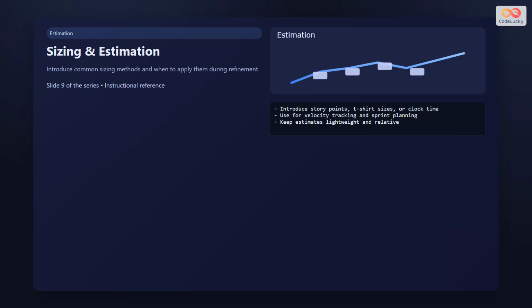Teams often face challenges during refinement. Requirements may be unclear or change frequently. Estimating accurately is difficult, especially for new technologies. Stakeholder involvement can be inconsistent. Some items may be too large to estimate effectively. The solution is to maintain clear communication, break down large items, involve the right people, and practice your estimation process regularly.